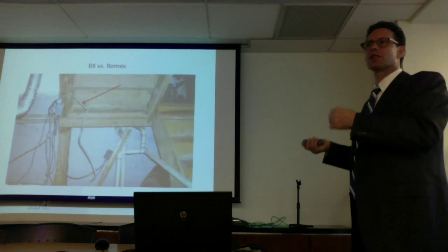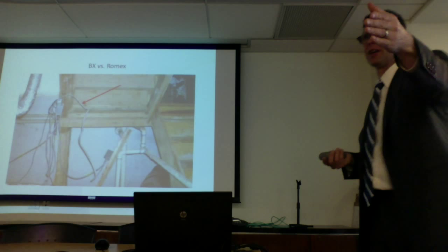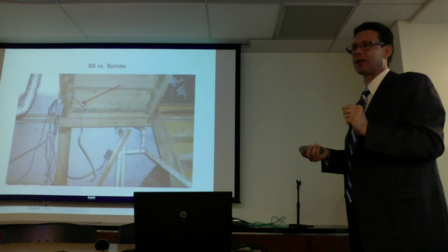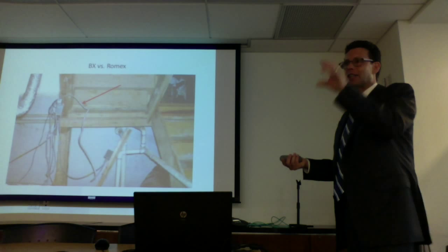If you see it in an estimate, it'll say outlet plus wiring. That's not for rough wiring. That's outlet and wiring to get to the next outlet, or outlet and wiring to get to the home run, but it's not for all the electric that's run under there. Keep in mind, in the crawl space or the basement where the electric meter comes in, and the panel is, that's all the electric for the second floor too. That's the electric for the house. It's not just the electric running to that outlet.